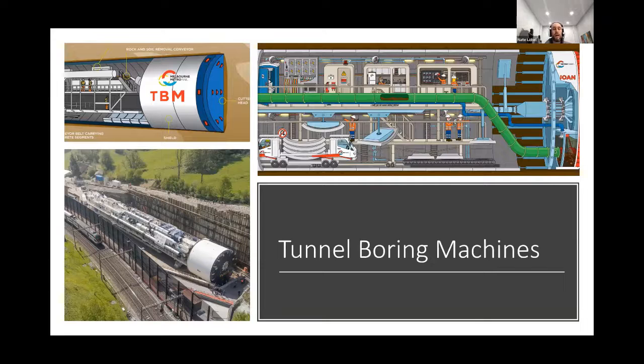Tunnel boring machines are quite interesting in that in some ways they've revolutionized tunnels and allowed us to create many more tunnels, longer tunnels, and faster tunnels. But at the same time, when we talk about building a tunnel fast, the tunnel boring machine down in Melbourne gets 9 meters a day on average. That's a good day of tunneling. But tunnels can be kilometers long, so it takes a long time.